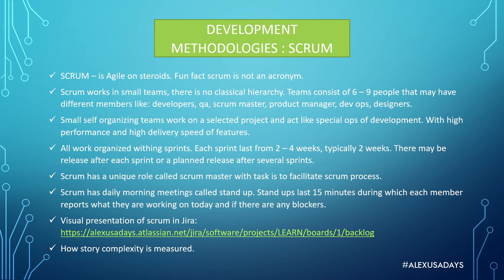So every time a sprint starts, developers and the team get together. They select some stories or features that will go into the sprint. They assess the complexity of those stories and pretty much they select their workload for a sprint. So for two weeks, you can't make the sprint longer or shorter. It has to be a certain amount of time, and developers and the team have to work around in order to fit that work in that selected amount of time within a sprint.